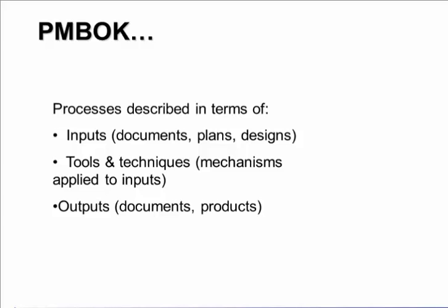So, including the form of documentation, which has the requirements. In fact, starting off with a functional requirement. The functional requirement, which is driven from the actual client, then is defined in terms of their requirements, what their needs are, what are their stated objectives, what are the cost constraints, what are the time constraints, all of which are established prior to the initiation.